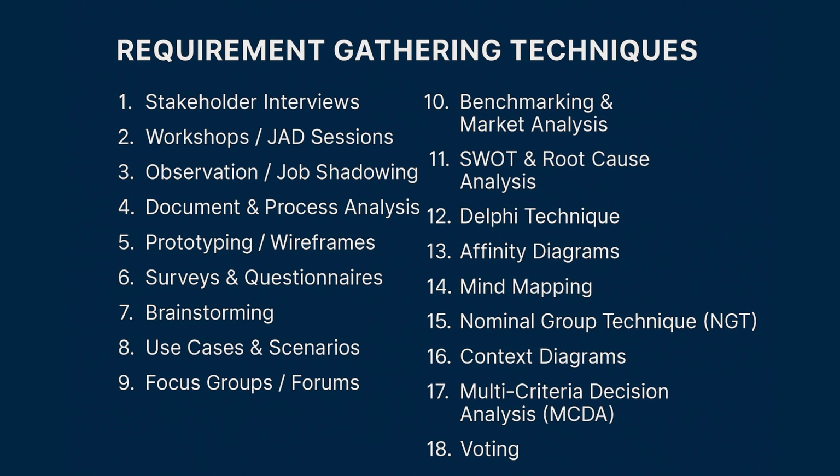Whether you follow an adaptive approach or agile approach, it is extremely important to understand that requirements need to be gathered clearly. All the requirements need to be gathered upfront for the particular requirement phase or for a particular sprint, because we know that whenever there is a missed requirement which is discovered late in the life cycle of the project, the cost of rework is going to be extremely high. Let us get into the commonly used requirement gathering techniques.